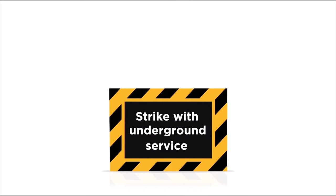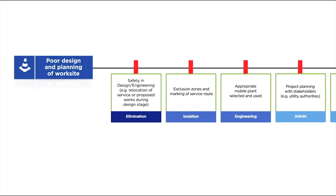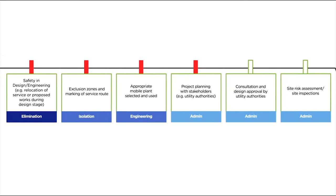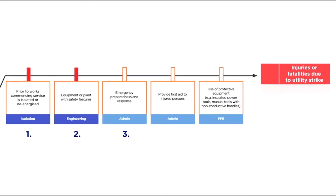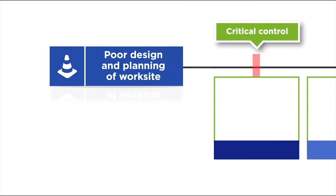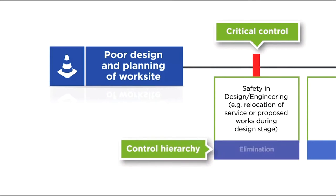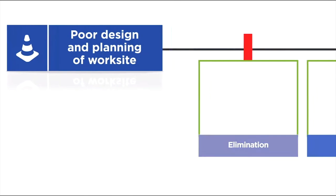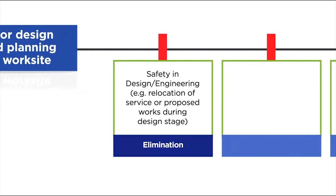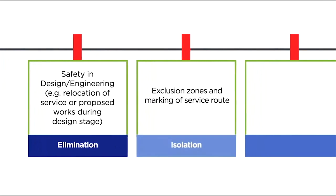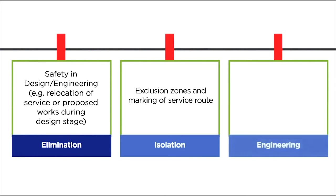The hazardous event in this bowtie is strike with underground service. Looking at poor design and planning of worksite as a contributing factor, six preventative controls have been identified and assessed. Our focus should always be on preventing hazardous events in the first place. Five mitigative controls have also been identified to lessen the impact of injuries or fatalities due to utility strike. Critical controls are shown with a red tab, with a detailed description and an indication of where in the hierarchy they sit. In this example, we can eliminate the risk through safety in design by relocating underground cables prior to commencing work, isolate the risk by establishing exclusion zones and marking out the underground service route, and select appropriate plant and equipment with fitted safety features to excavate around underground services. These critical controls are essential to protect workers from injury or death.